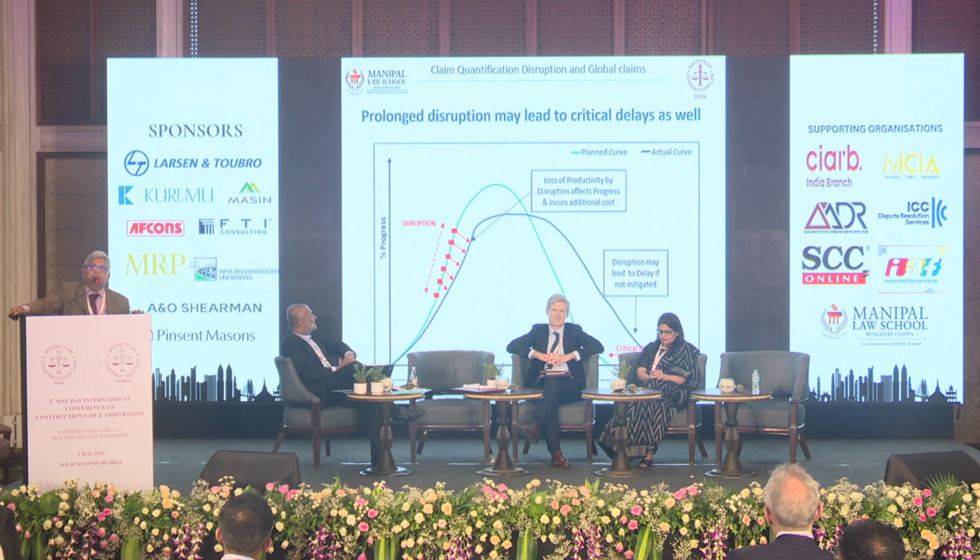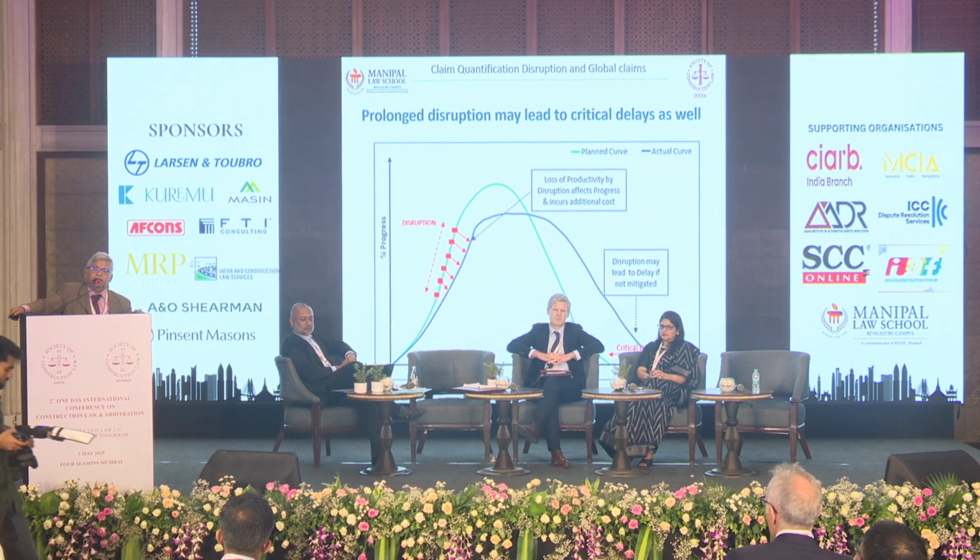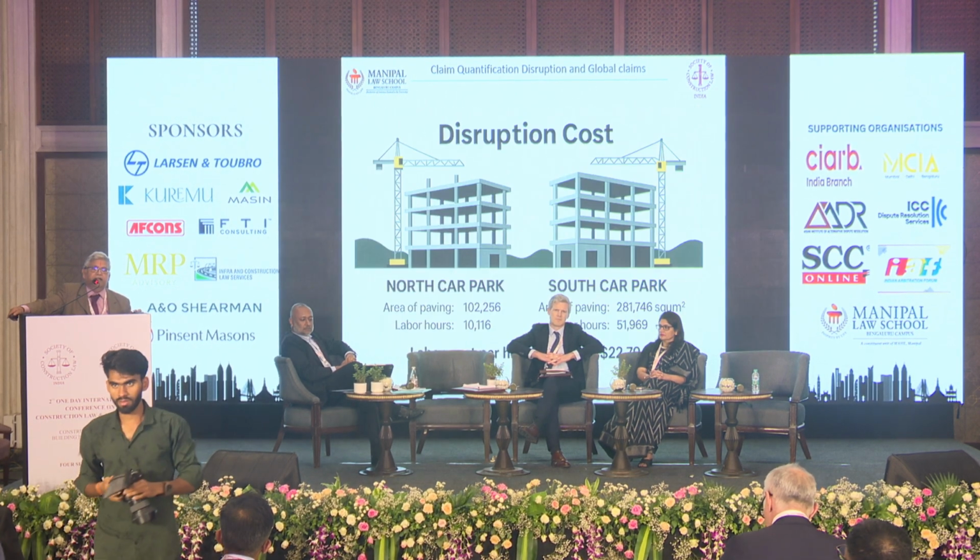Sometimes we start with a disruption in a non-critical path, but it could be for a longer period of time. At the end of the day, the disruption also could result in a critical delay. That's how most of the projects will start with a disruption. Then we end up in a situation where the project is disrupted as well as delayed.